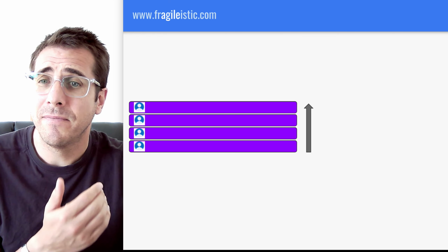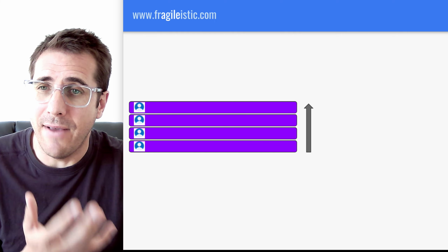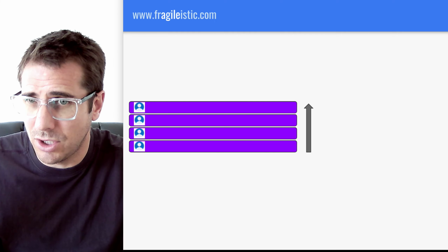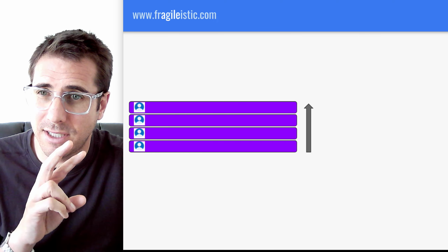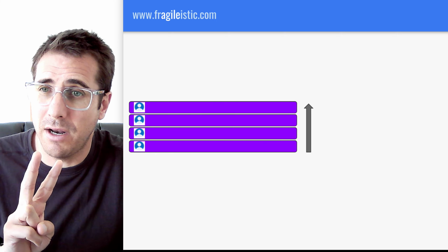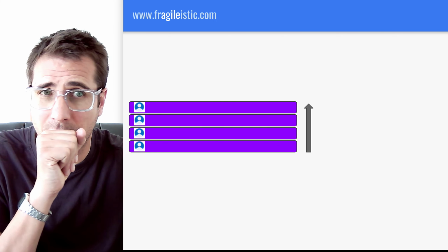The next thing is, in order to promote that prioritization, you do need owners. Every single card on every single backlog should be assigned to somebody. Even if it's in the to-do, it should belong to somebody. So make sure you've got owners. It's the second thing of a good, healthy backlog. So the first thing is make sure it's ordered. Second thing, make sure every card belongs to somebody and someone's taking ownership of those cards. Might be the same person through the whole backlog.